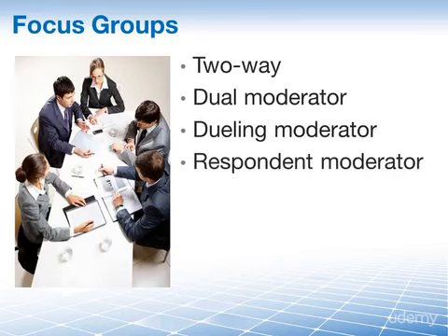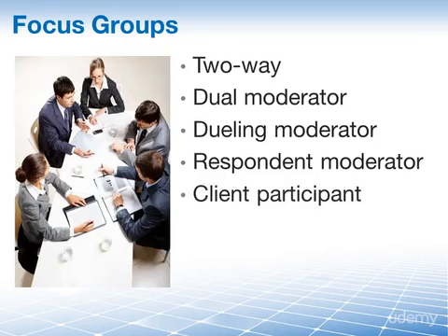We have the respondent moderator focus group, where one or more of the respondents acts as a temporary moderator. We have the client participant focus group. This is where one or more customers participate covertly or overtly in the discussion.